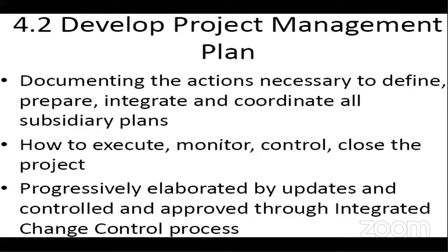So the charter becomes an input. In fact, the charter and the product that comes alongside the development of the charter both become inputs to the development of the project management plan. So the project management plan will contain the details of activities, procedures, systems, the entire project scope, the human resources, communication plan, quality plan, and all of those other plans being integrated in one piece.